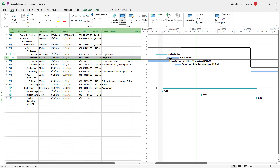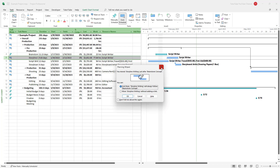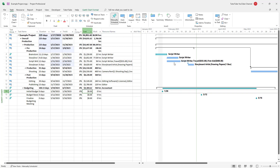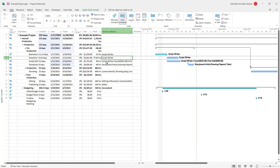Once I do that, I can change the time right here, and you can see that the tasks are overlapping now. Once the tasks overlap, the script writer is assigned to two different tasks at the same time, which is an over-allocation.